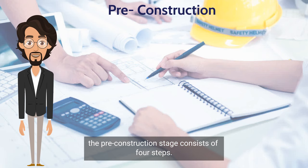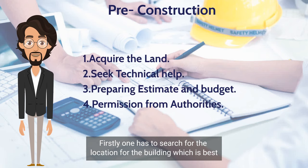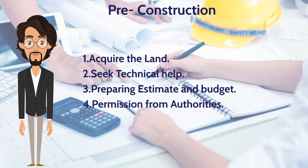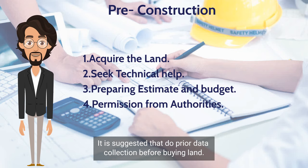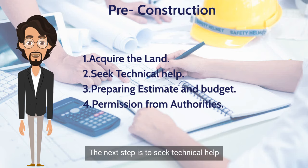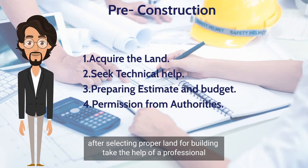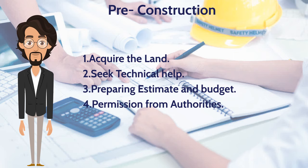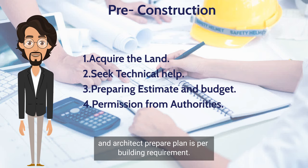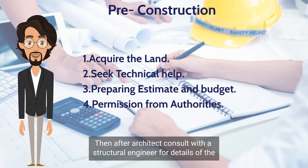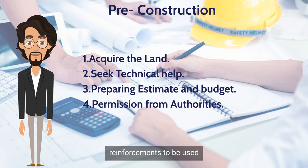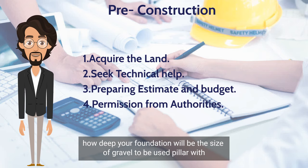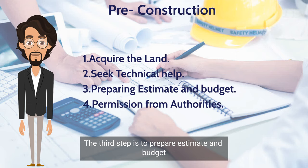The pre-construction stage consists of four steps. Firstly, one has to search for the location best suited for building construction purposes. It is suggested to do prior data collection before buying land. The next step is to seek technical help — after selecting proper land, take the help of a professional architect to create building designs. An architect prepares plans as per building requirements, then consults with a structural engineer for details of reinforcements, foundation depth, gravel size, and pillar width.